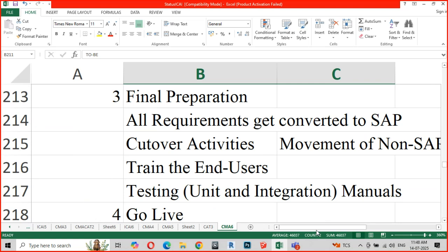Understood? So whatever system was used earlier to SAP, there is some data till the 14th of January 2026. Now, by the 14th, I should have compared the statements delivered by the non-SAP system with the statements delivered by SAP. I compared both those reports. Are they tallying?